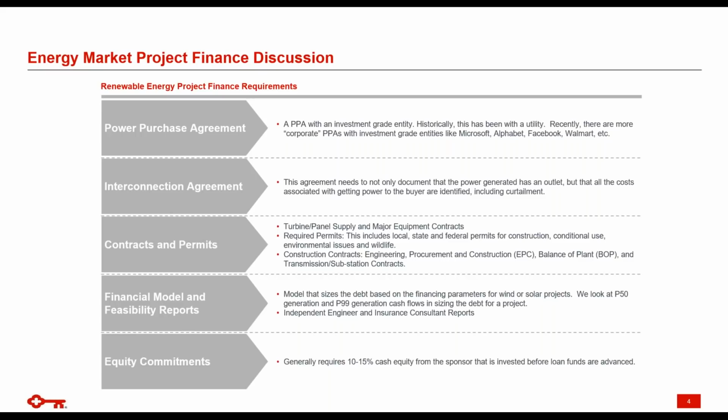I think that's a relative statement, and making sure that you have some of these other things addressed, making sure that there's adequate resource studies, adequate design done, a power purchase agreement is either completed or is in process, all these other things of interconnection agreements, contracts, and permits, making sure that all those are addressed to a significant point will make it much easier then to bring your project into a bank, into a source of tax equity or equity, and make it much easier to get financing.